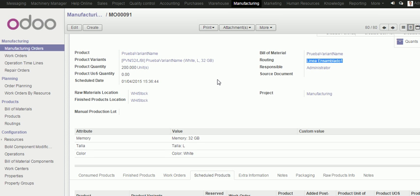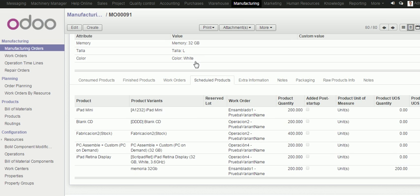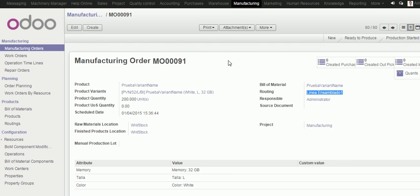The estimated cost will be generated and collected just when we confirm the order. So, it's not necessary to finish or make the order done to have collected all estimated costs for the order.